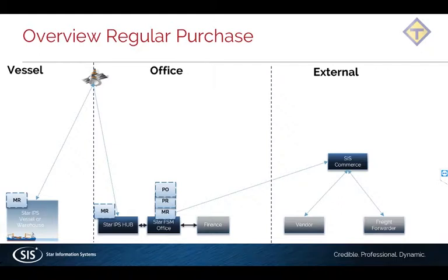So he's aware that at some time he's going to receive these goods on behalf of you. If the vendor approves the PO, because you can have a gap between the quote sent to you and the time you send the order back to them, which can be 1 week, 2 days, or 3 days, once he confirms that all items are still available for the same price, he sends you a document called the PO confirmation, called POC.